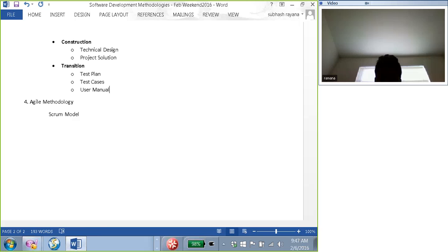And if the question comes to you, okay, how long will it take, and you're not sure, do not give a time saying, oh, I'll get it done in a day or two. If you don't know the volume of work involved, you can always say, okay, I can get back to you in the next 10 minutes, 15 minutes, or 1 hour, and I'll let you know how much time I would need.